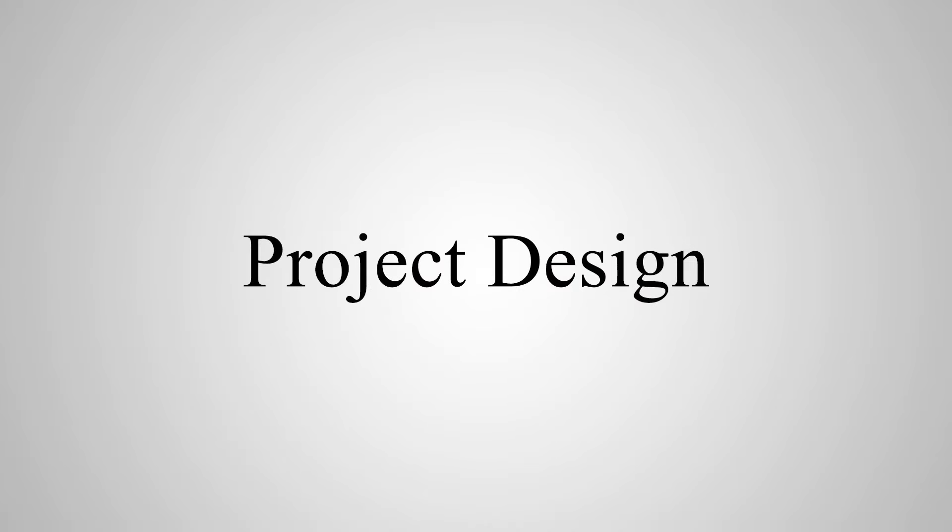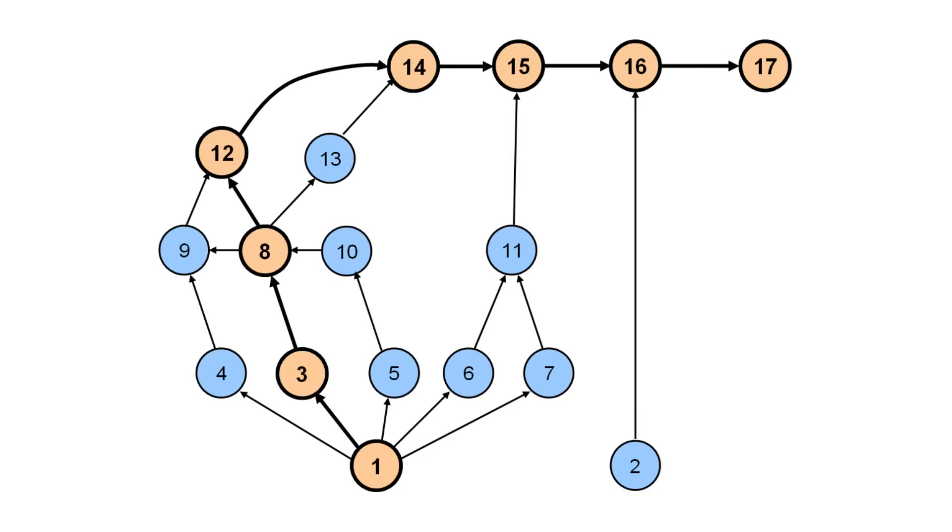The second part of the book is about project design. With the architecture at hand, you can identify the various activities in the project, and even their dependencies. This enables you to model the project as a network of activities, and then find the longest path from the start to finish, called the critical path.